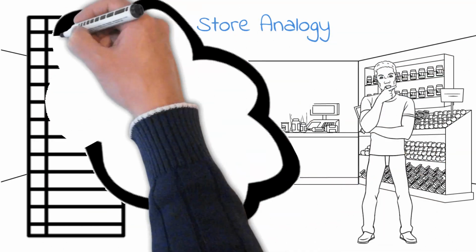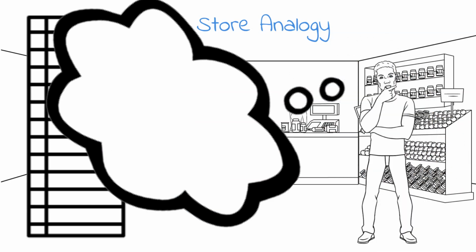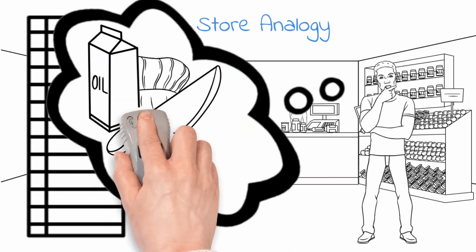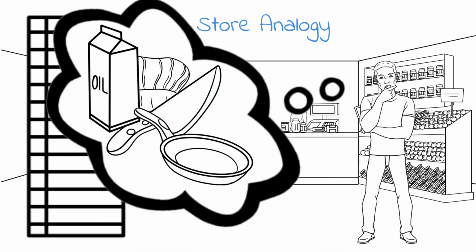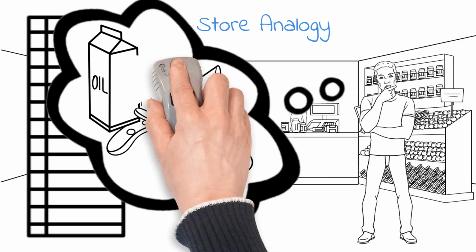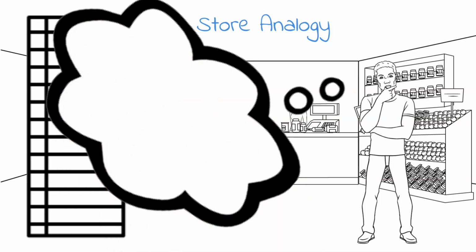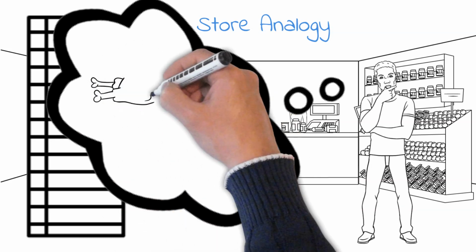We do want to be careful when we're creating a WBS because it's natural human instinct to think all the way from, I want to create this thing, what is it going to take to create it, and start thinking about the work itself. We stop before we get to the actual work, the activities, when we create a WBS. We only want to capture the things that need to exist at the end.